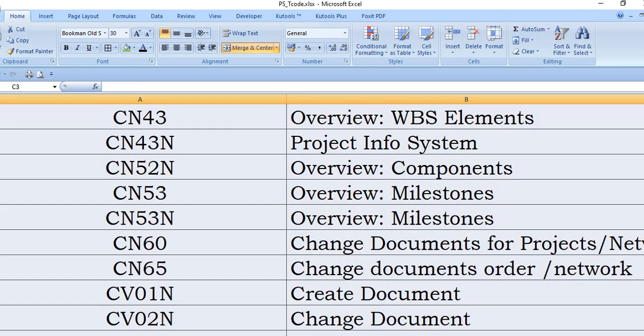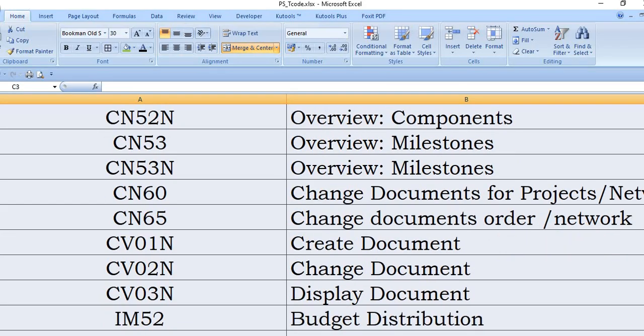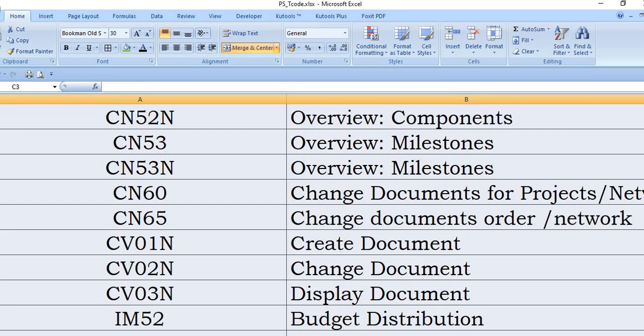CN65: change document for order and network. CV01N is an SAP transaction code to create the document. For example, during the starting of project creation, we have done a survey and the survey has completed and competent authority has approved the survey documents. So we need to create this document using CV01N and upload those data in PDF form or Word form.